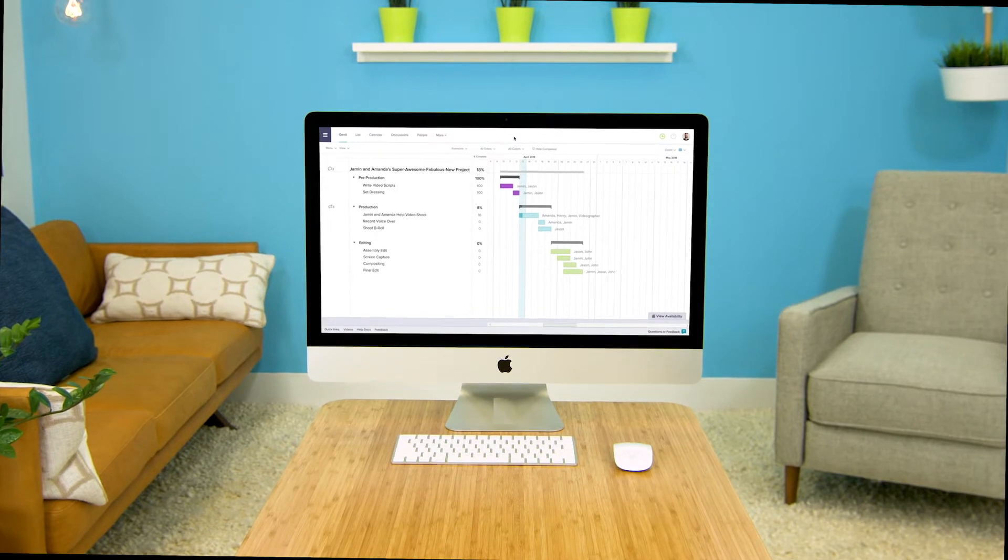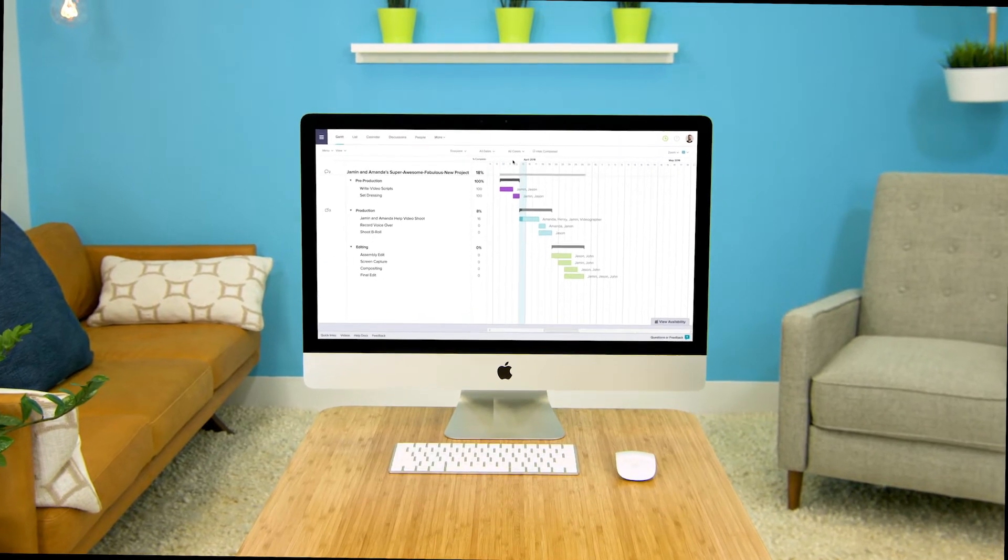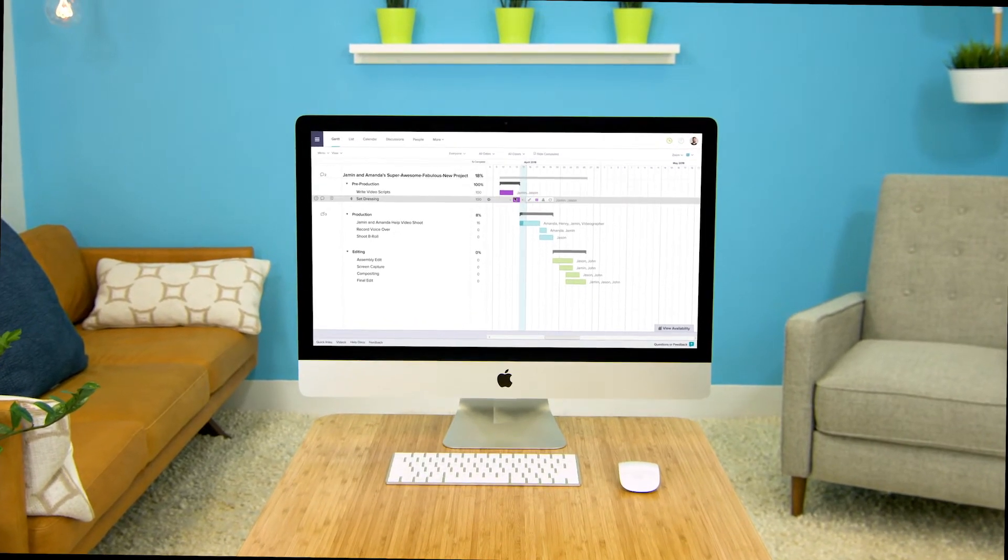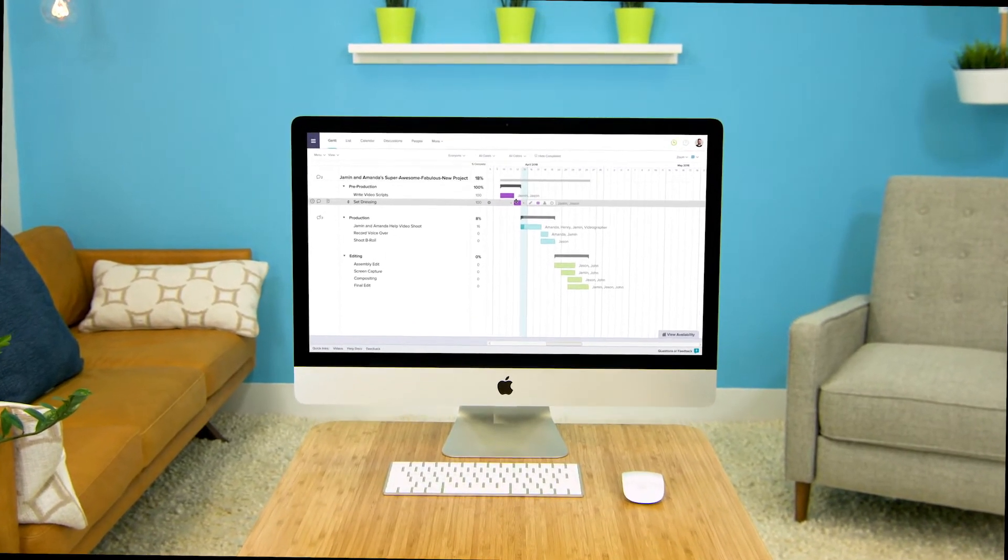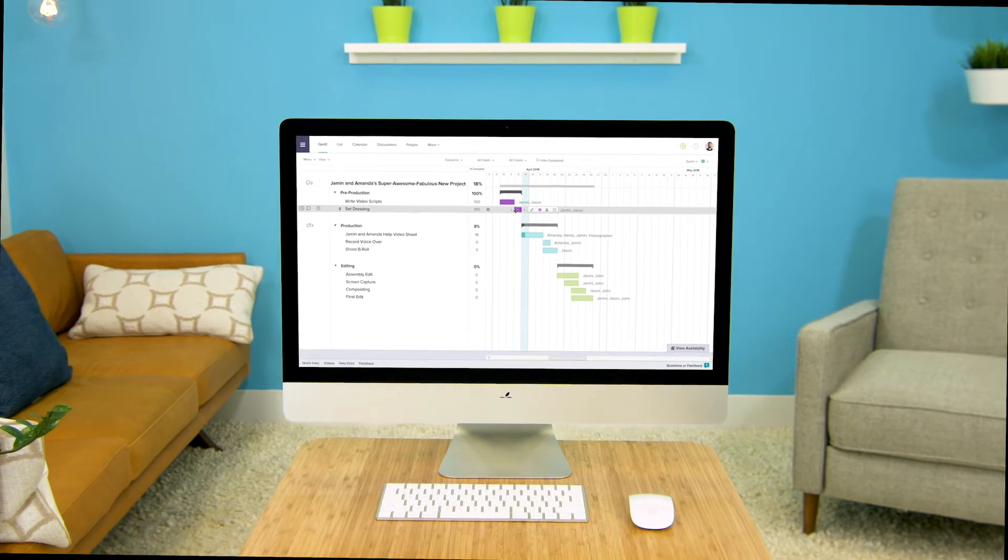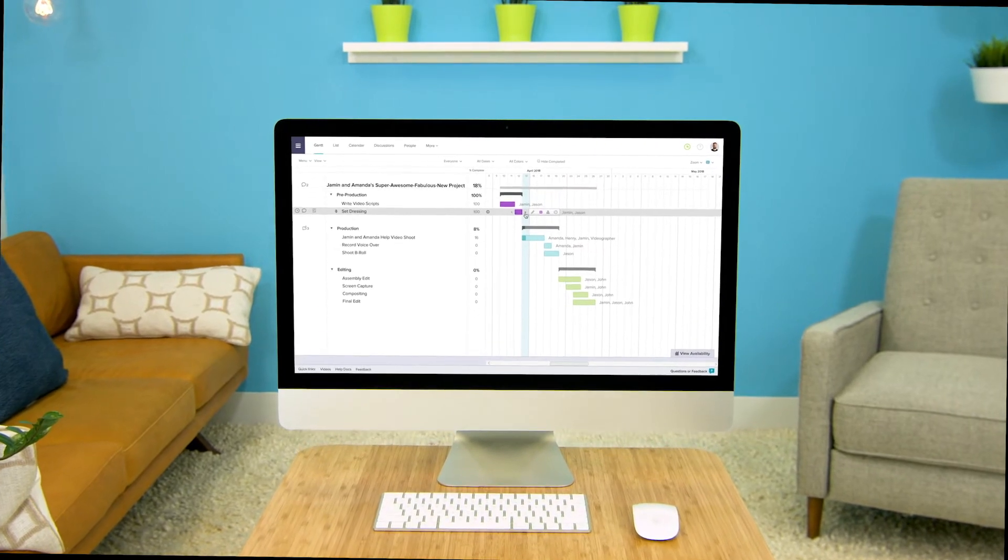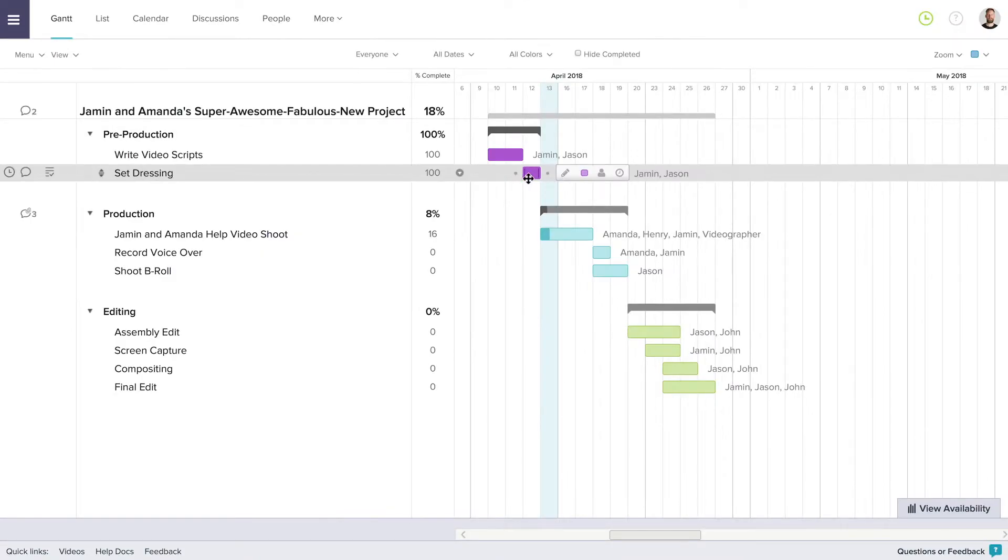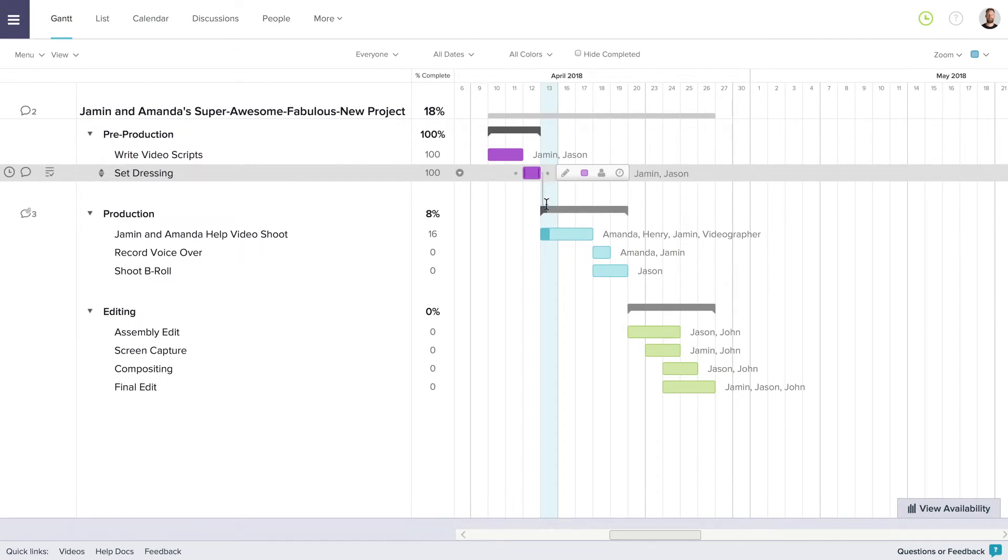In the timeline, you just mouse over a task that you want to add a dependency to. You'll see a gray dot on either side of the taskbar. Click and hold the left dot if you want the task to follow another task, or the right dot if you want it to precede another task. Now while still holding, drag the dependency line to another task in the timeline and connect it.